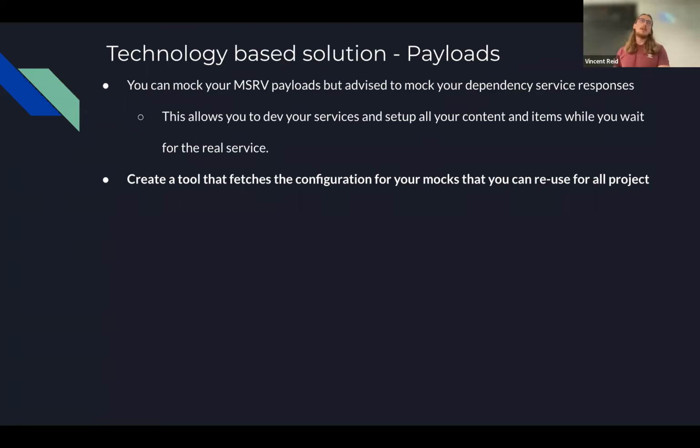And that last 10% will come into verification, right? So that's when you actually have the service, you want to check that your data is returning everything as expected. So always in your plan, account for the fact that you need to come back and verify that your code is actually correct, because what would end up happening is you agreed on mocks and permutations of responses with your given dependency service. And lo and behold, they might change some things on that response, and now your code isn't ready for that.